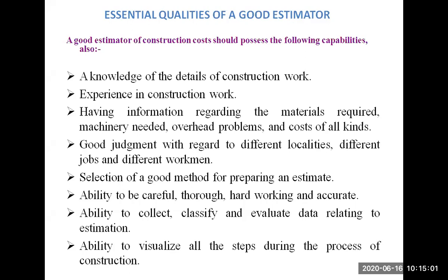In the cross section, the dimensions of that particular footing, or the dimensions for the excavation, will be clearly mentioned. Then, where is my plinth level? At what height is it? Is it 0.6 meter above the ground floor, or is it at ground floor level? It is at some particular height above the ground floor level. So you need to collect all the data which are needed for making the estimate.